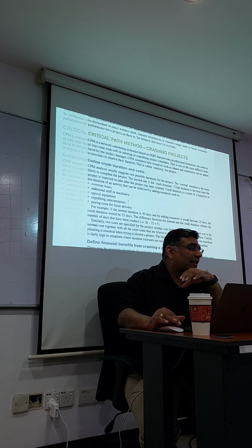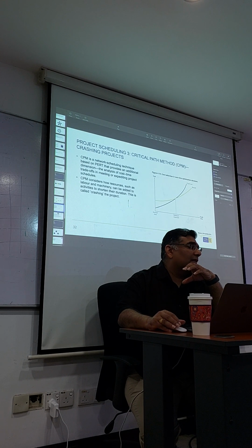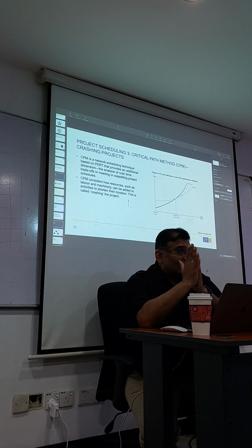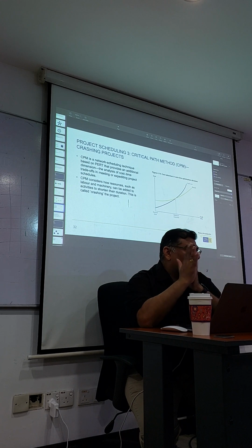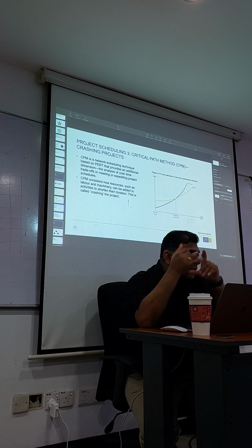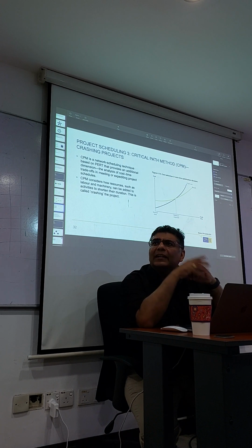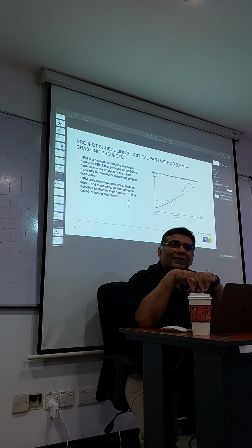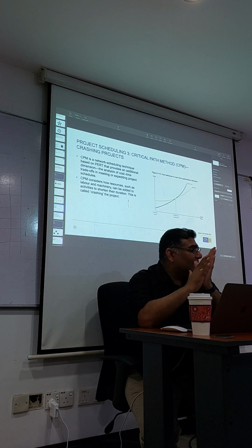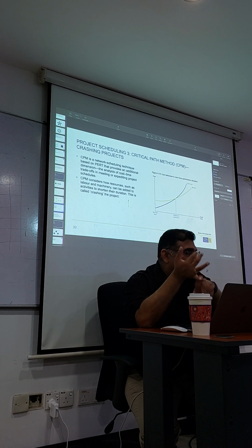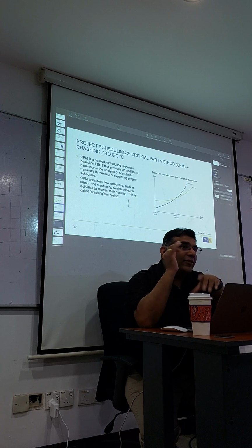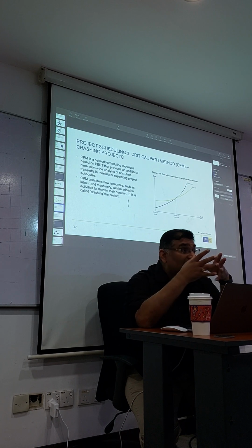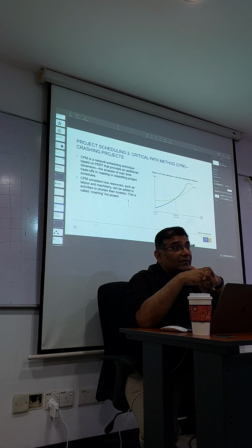Okay. There is something called crashing the project. When we say critical path, we want to crash the project. So CPM is a network scheduling technique based on PERT that provides an additional dimension, analysis of cost and time trade-off. CPM considers how resources such as labor and machinery can be added to an activity to shorten the duration. This is called crashing. If you add labor and machines to an activity to finish it faster, what will happen? Your costs go up. Your duration can come down.